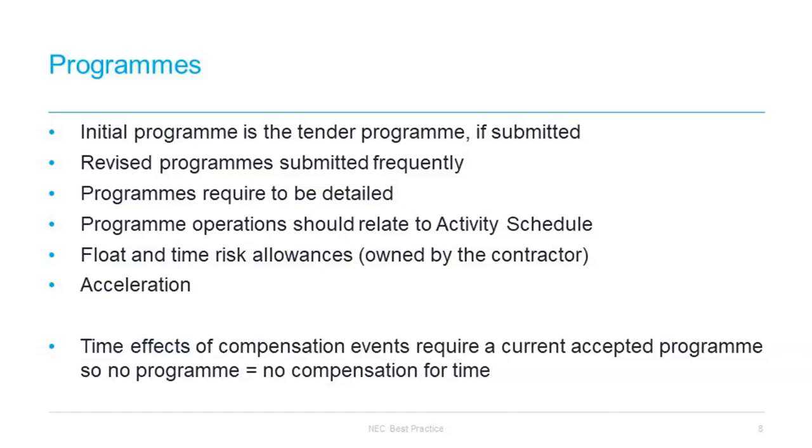If a contractor is falling behind on a program because of the contractor's own issues, then they might suffer LDs, liquidated damages. If the contractor is falling behind a program because of employer issues, they might get a compensation event that pushes time out. However, there is no acceleration under the NEC contracts as defined under NEC in either of those situations.